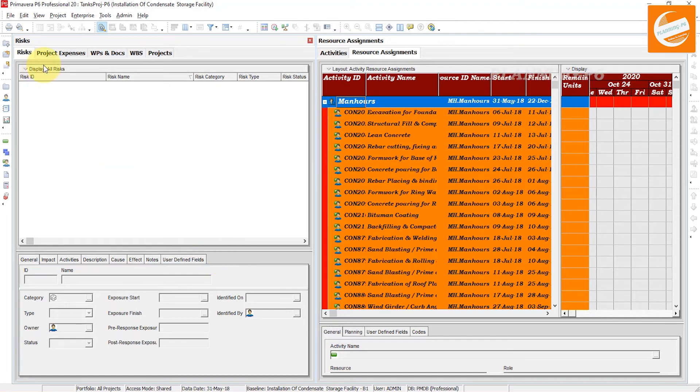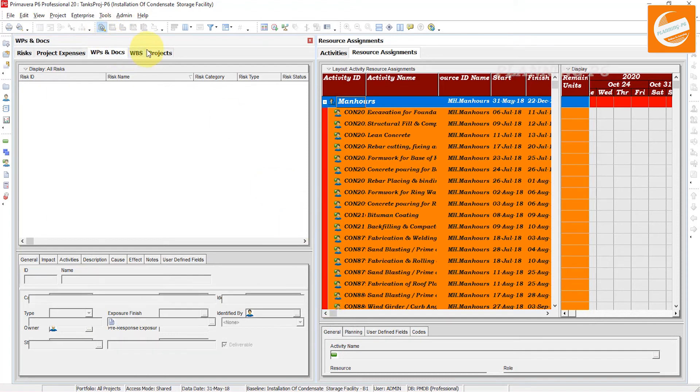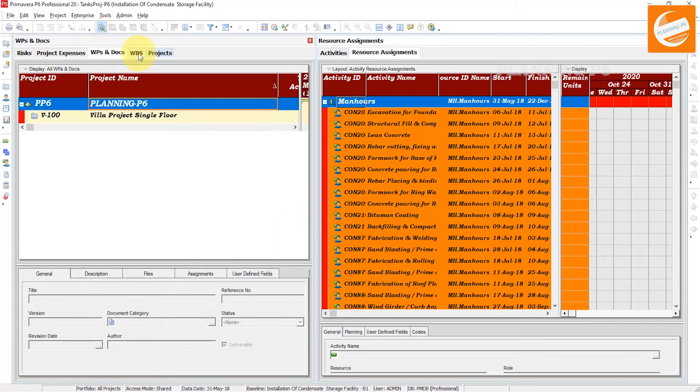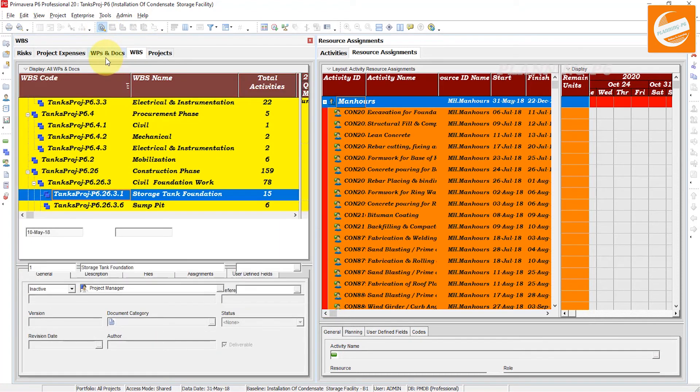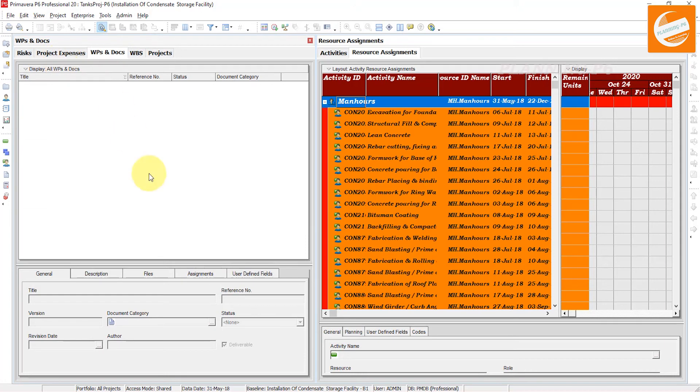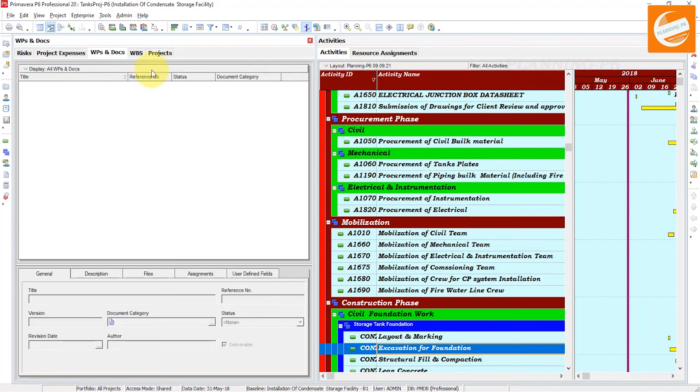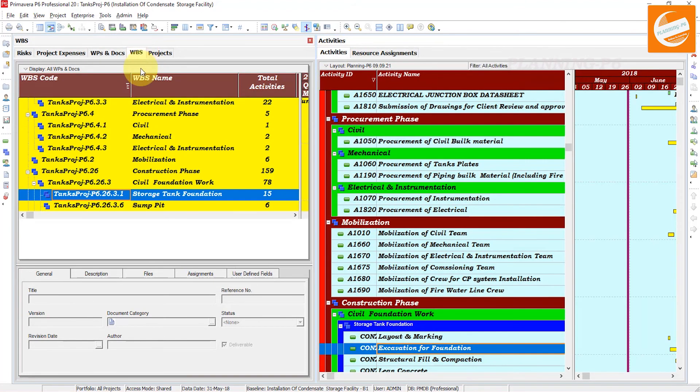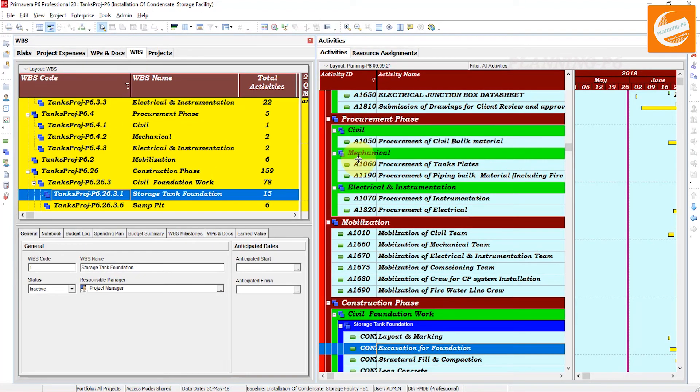This is how you can use the tab groups in Primavera P6. If you have opened the Activities here and the WBS here, if you want to change something in WBS, you can change from here and watch here.